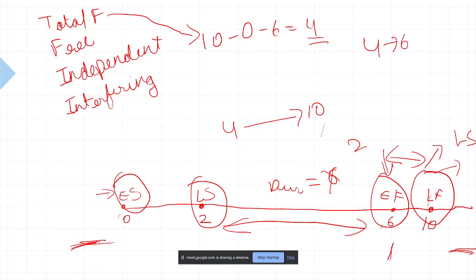So what if you finish your activity from the early start till early finish only? There is some scope, but this ensures that your succeeding activities have their own floats, I mean, they don't get affected. So when you adjust your activity in this part, this part minus duration, it is your free float.